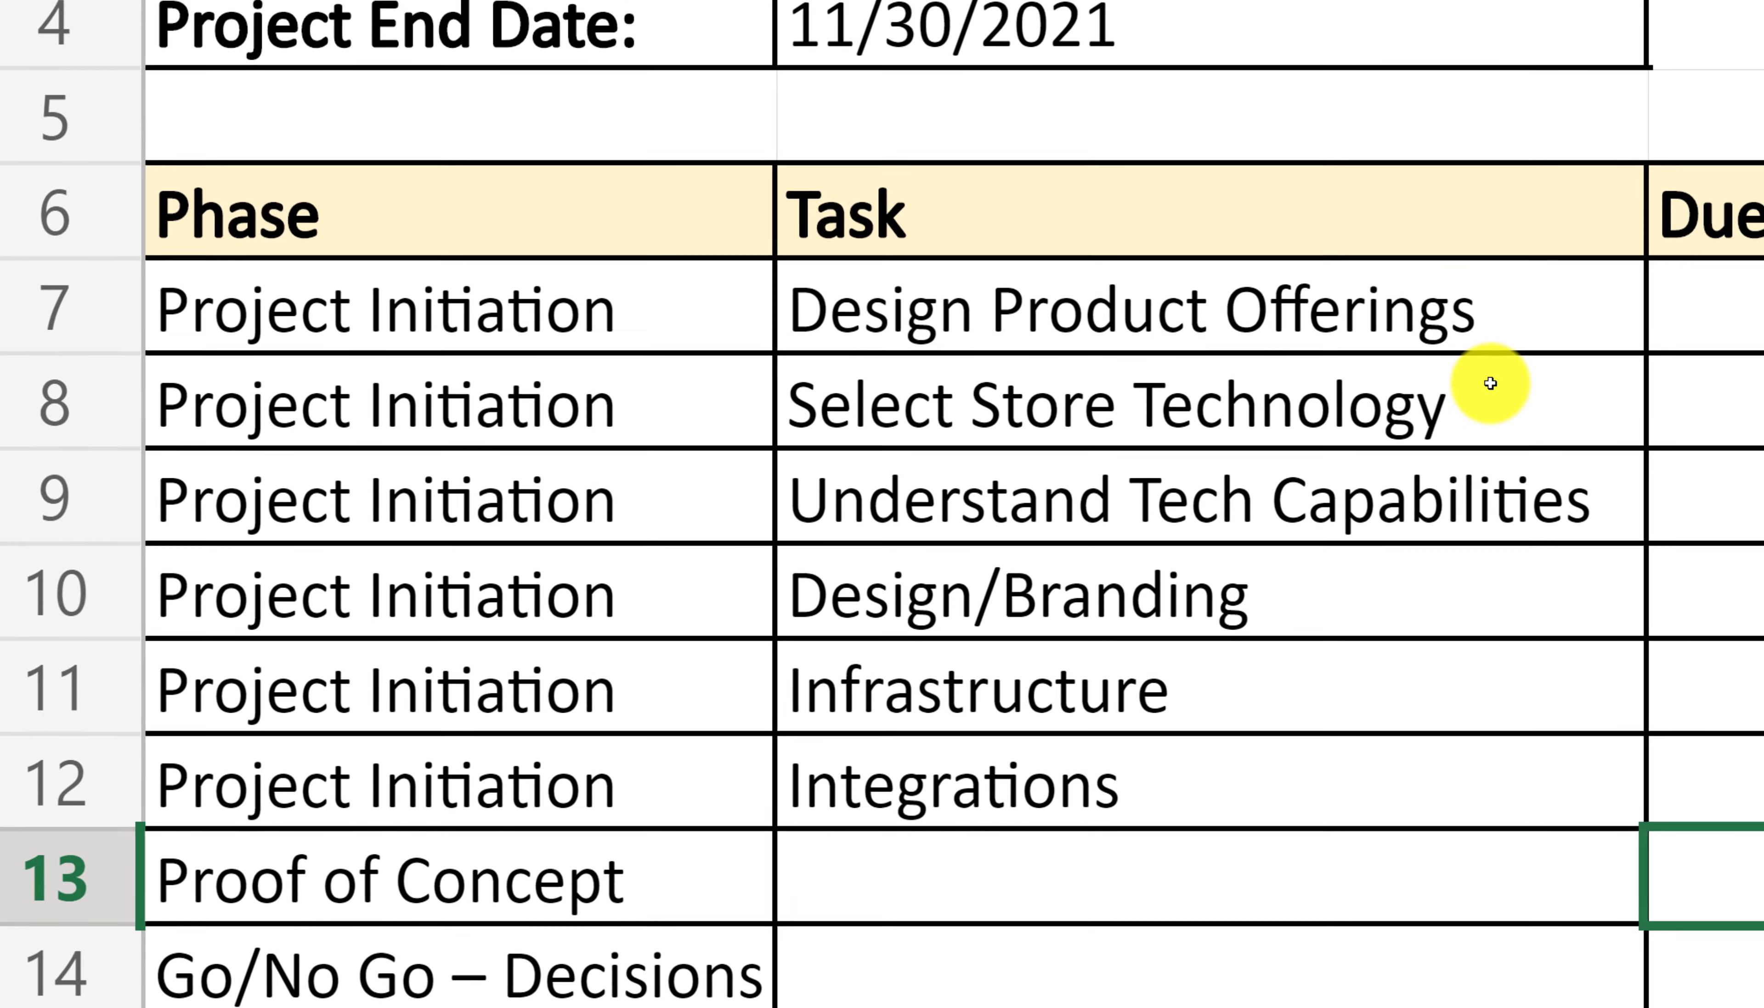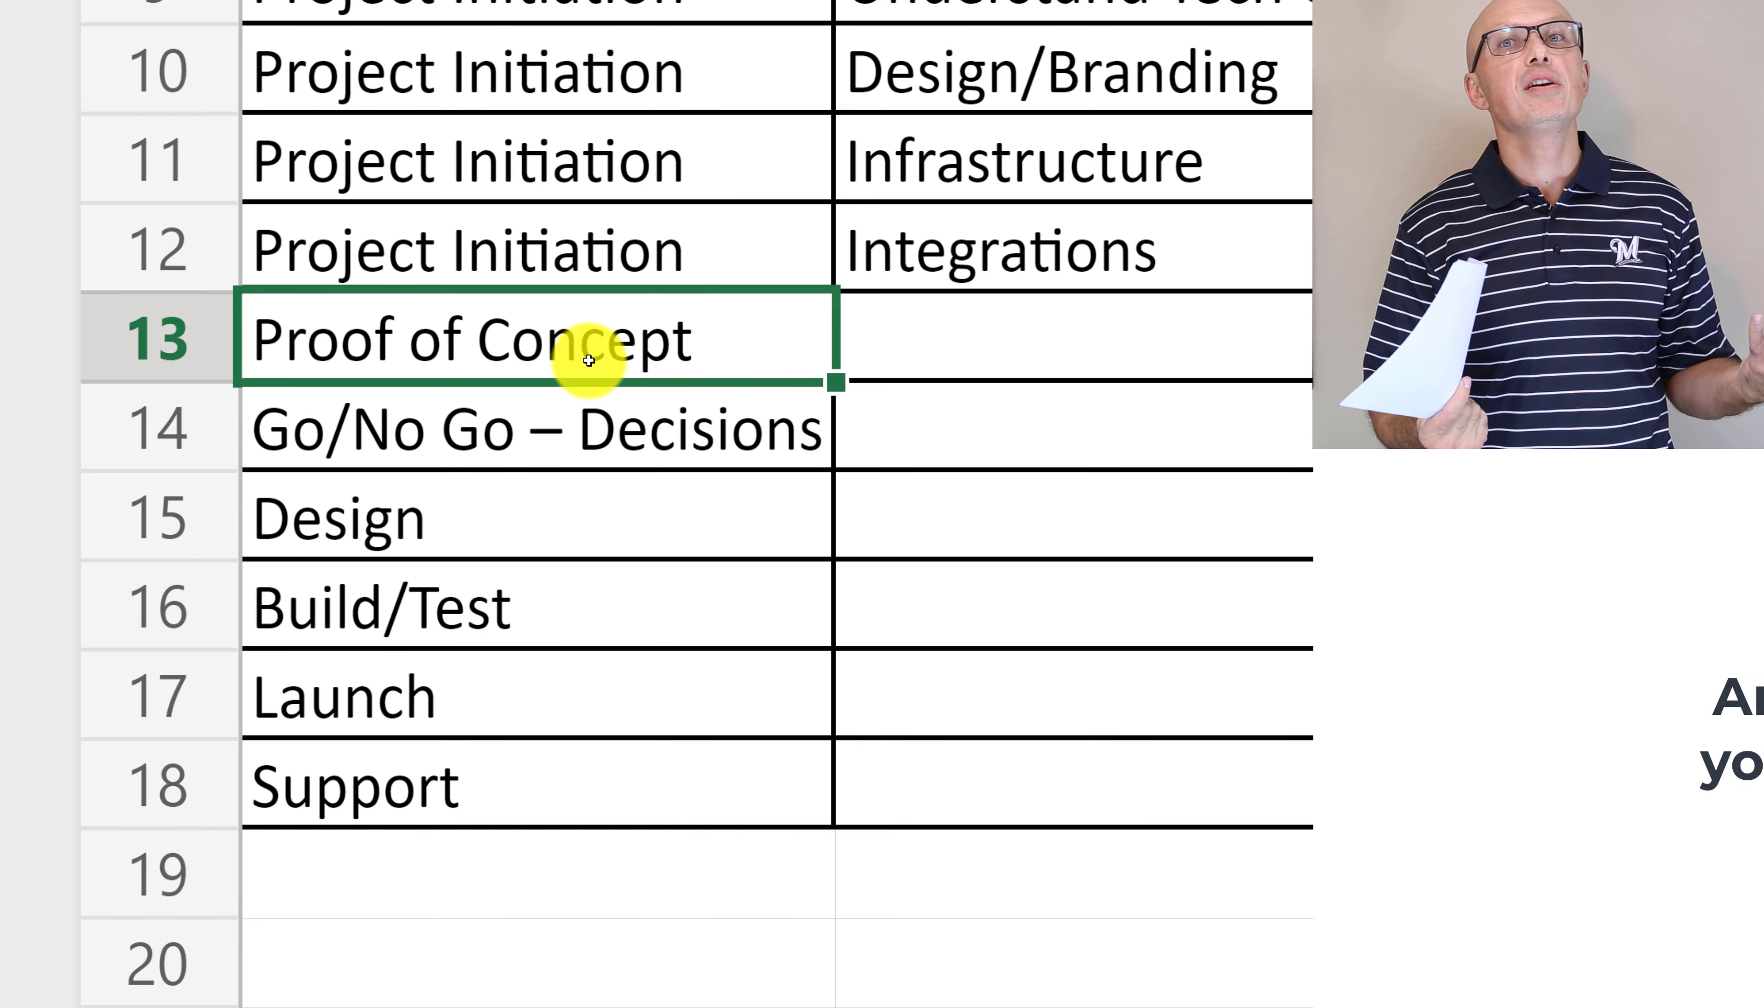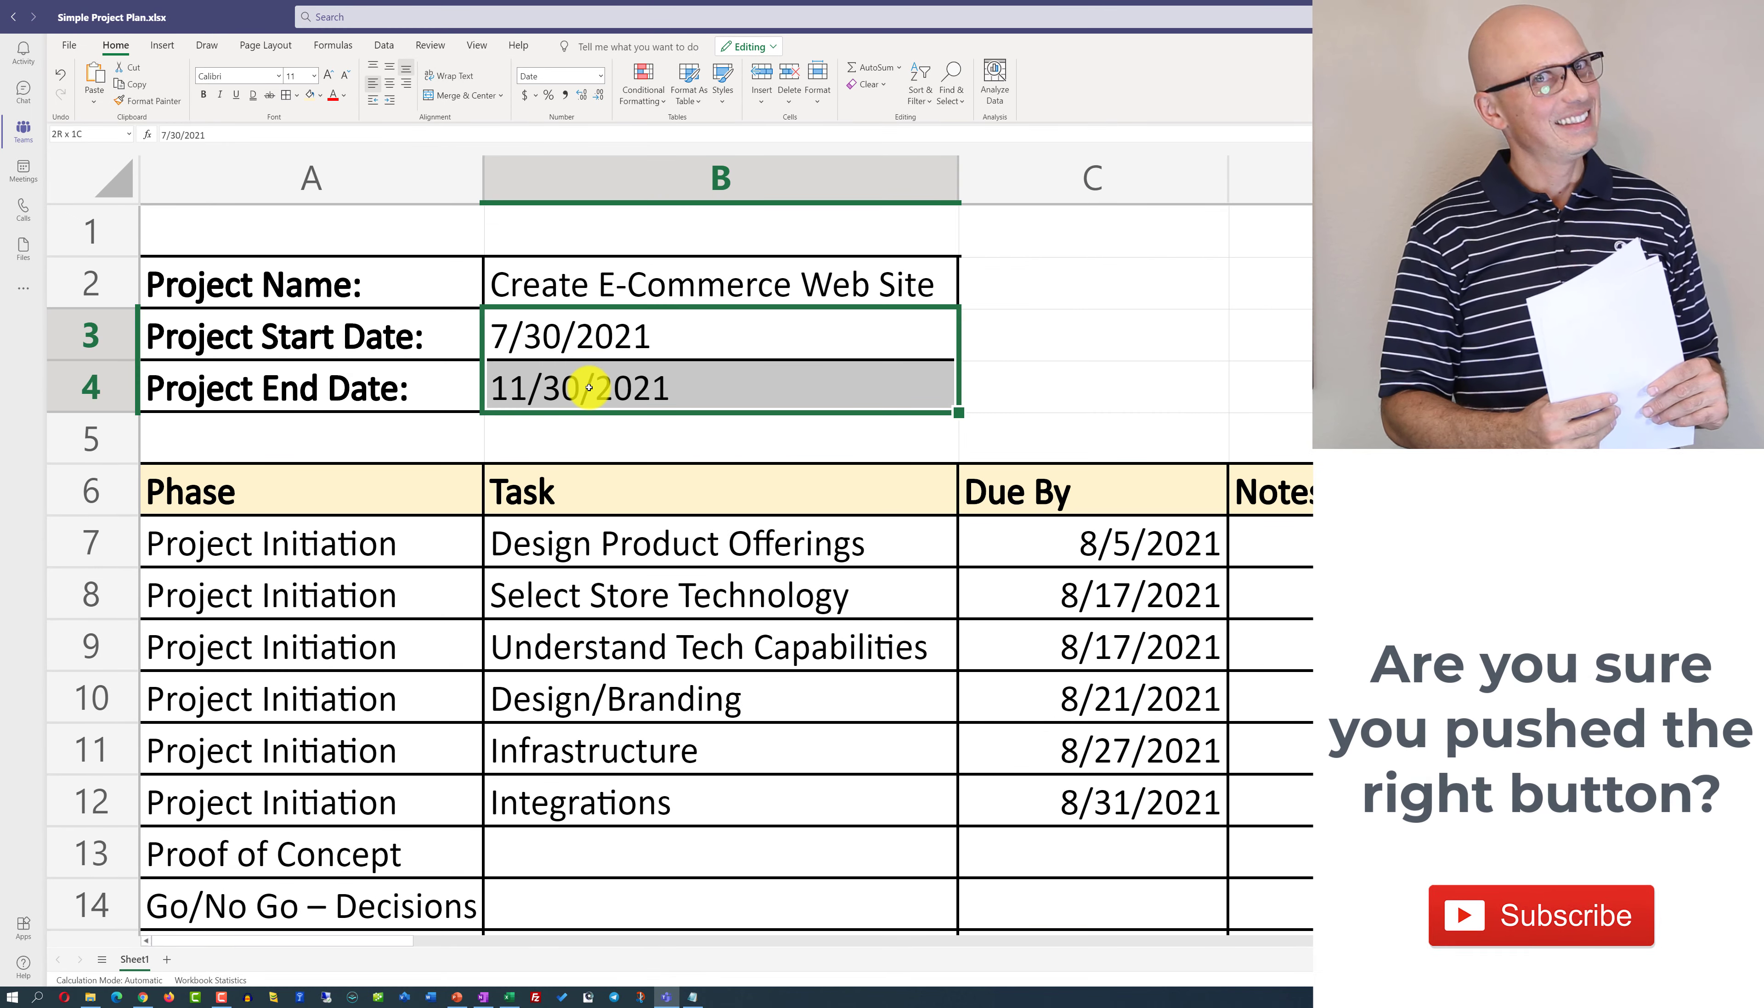Once you're done entering the tasks, you can expand the category and the phase of project initiation across all the tasks that you've entered. Once you have entered the tasks, you can also assign the due date. The due date might be different for each individual task. And you might want to give yourself some time to make big decisions. For example, how would you select store technology? You might want to consider doing a lot of research before you finalize something and select something as your final choice. Some of the tasks could also run in parallel. For example, you can select store technology and then do design and branding and also understand your integrations in parallel so you can assign different people if you're running this project for multiple people. Once you're done entering tasks for the initiation phase, you can also brainstorm what would you need to do as part of proof of concept phase, go-no-go decision phase, design phase, build and test phase, launch and support phases as well. Once you finalize the list, you can enter all of these tasks into the tasks column and then keep track of these tasks and assign due dates based on the initial dates of your project plan.